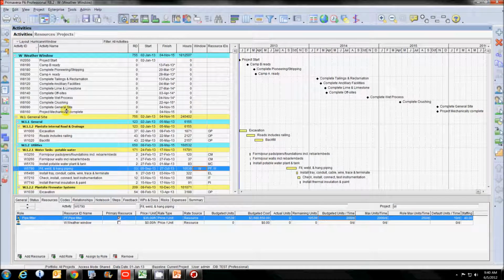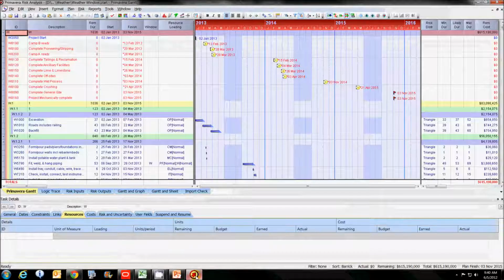One thing I do is I export everything with the XER file, because I find my activities that have some constraints, even though these are soft constraints, are not picked up if I go through the tools command. So we're now into PERTmaster, and this is what it looks like after we've done all our magic to get it in there. I've shown that before, so I won't go into that again. What I will show you now is how we add the winter window. And again, the key here is this W and the resource.